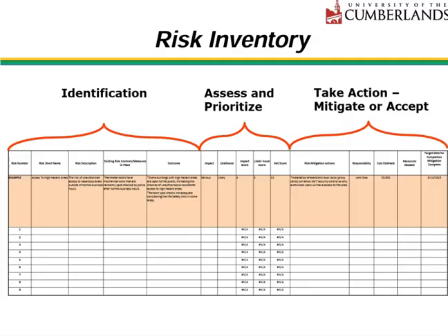And resources needed identifies what's required. And finally, target date for completion sets a deadline. And mitigation complete tracks whether we actually finished and met the required date. So this kind of systematic documentation transforms risk management from the abstract discussion we've been having so far into concrete action and accountability.